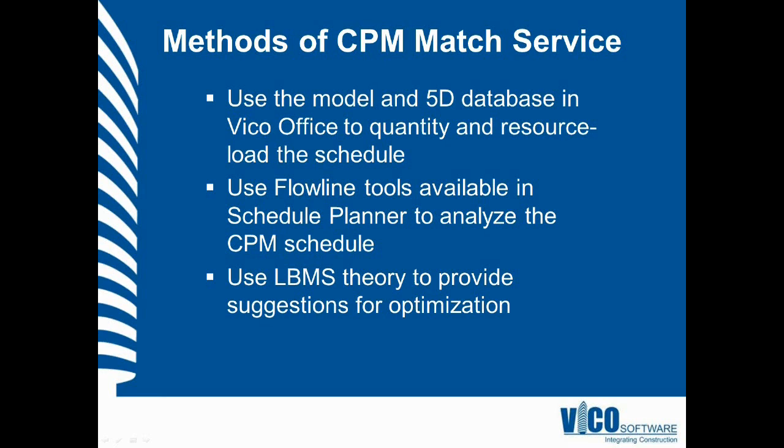And finally, using the LBMS theory to manage your resources and to provide that optimization and to reduce the overall risk on your project. And so, following these tenets, we provide a schedule file that's aligned with the CPM. We provide an analysis that identifies all the areas that we have found room for optimization, or at least areas that we may want to just validate before submitting the baseline, and then using those to target some optimization decisions within your phase milestones or prior to submitting the baseline for approval.